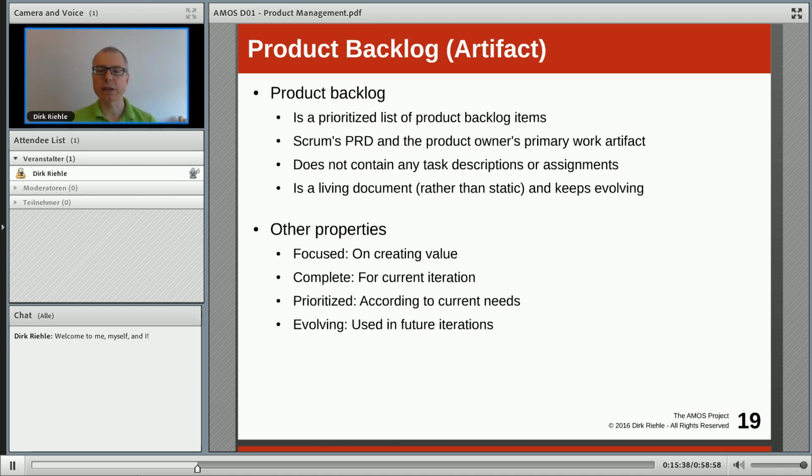And as you look at the product backlog, it has various scopes or time horizons associated with it. The product backlog entries at the top must be very well described because they are ready for implementation. The top few items that will be implemented over the next few sprints need to be really precise, really high quality, so that the team can pick them up and know what they are doing.